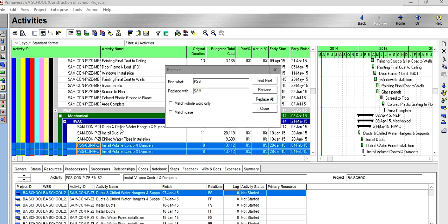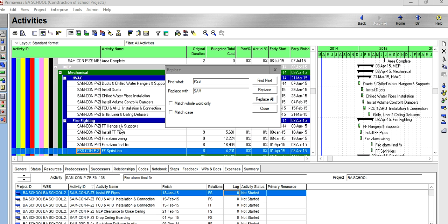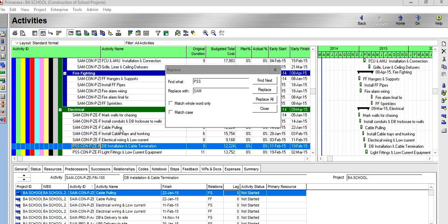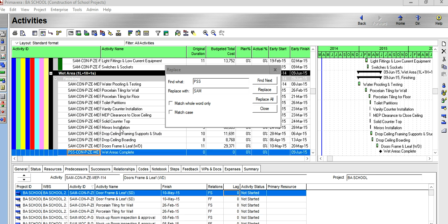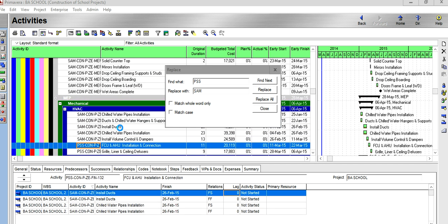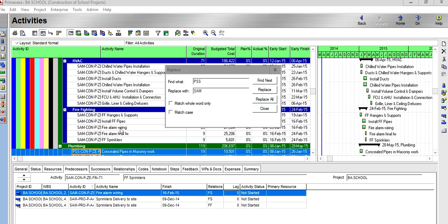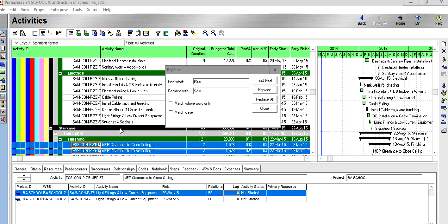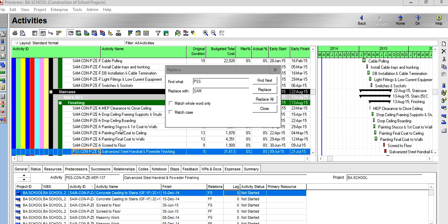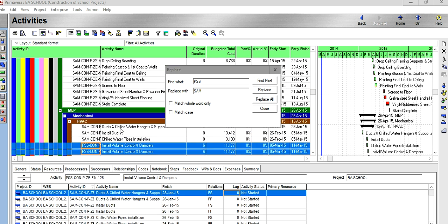You can submit the valuation after 30 to 45 days, and you can collect the money then or later. So we have to make sure that we manage the cash flow. Within 30 to 45 days, you don't have any collection. You have to wait for that collection. So we have to utilize